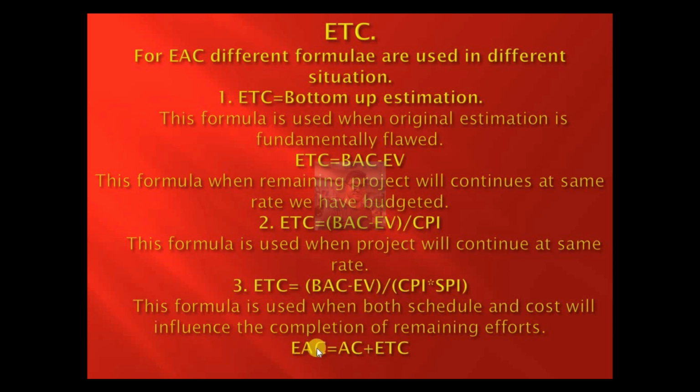Then there is the formula for estimate at completion. Estimate at completion is equal to actual cost plus estimated cost of remaining work.